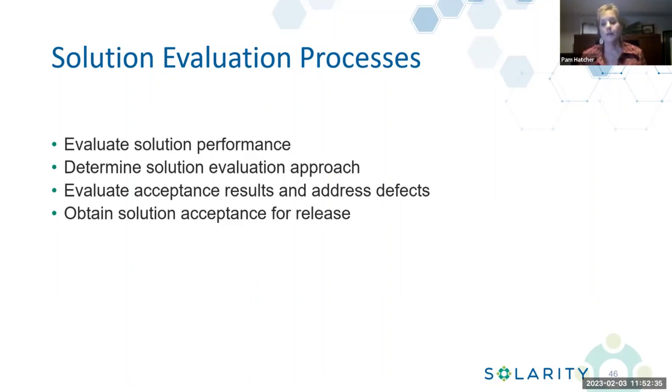And then solution acceptance, which is facilitating a decision on whether to release a partial or full solution into production, and then eventually to an operational team, right? Because that's what a project does, it passes on to the operational team, and transitioning knowledge about what has taken place to that operational team is also a very important process. You need to make sure that's outlined and you have that acceptance criteria for the whole solution.